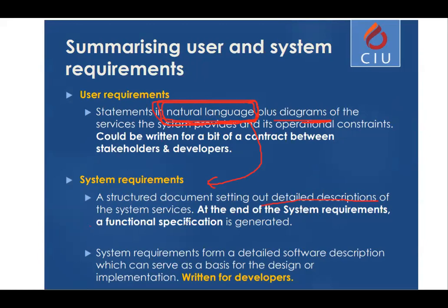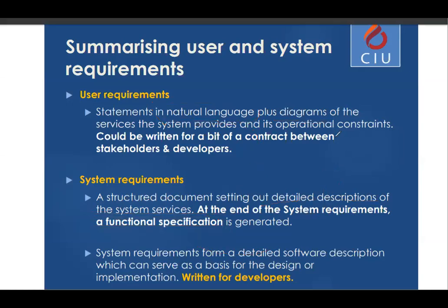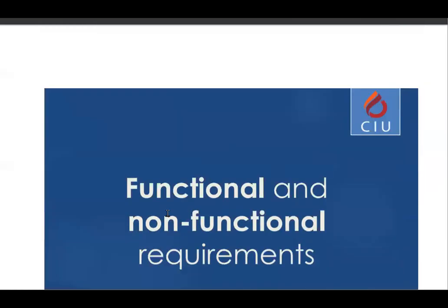At the end of the system requirements, a functional specification document is released, and these specification documents serve as a base for design and development. So this is when design and development starts. By completing the system requirements, you can start design and development. Of course, many activities run this concurrently because they skip the requirements. But in a hierarchy, technically, you need to release a functional specification in order to go to the next stage of development and design.